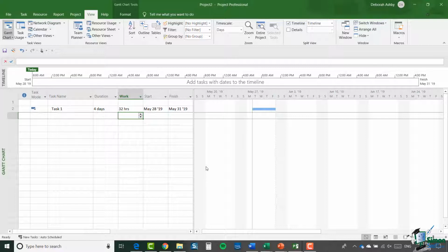And then there is a second aspect as well to earned value analysis. We don't look at it in an absolute set of metrics. The way that we look at earned value is by comparing cost and value with what we've budgeted for. What did we originally think we were going to do? And to be more specific, with the baseline that we're comparing progress against, what was our baseline cost and our baseline value? And what is now our actual cost and actual value? And are the actuals better or worse than the baselines? And that's really the second element of earned value analysis.